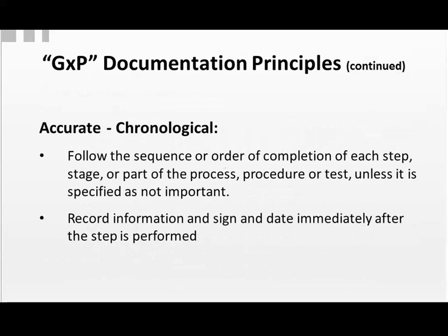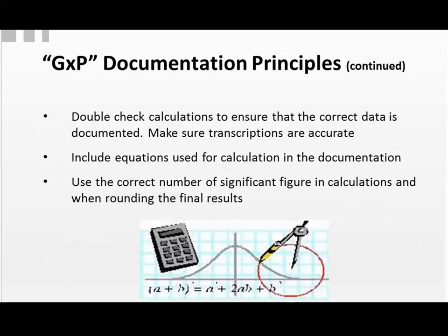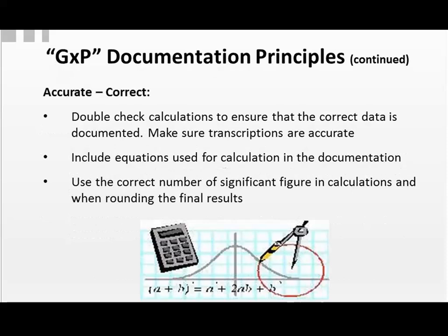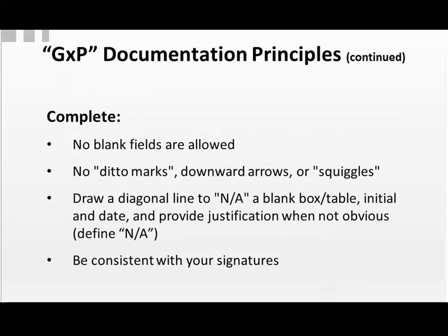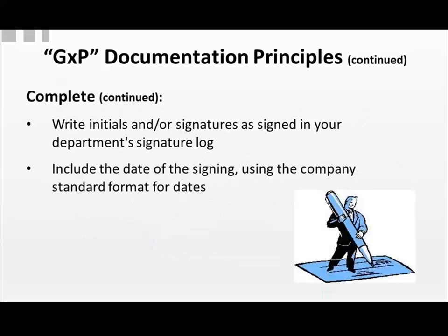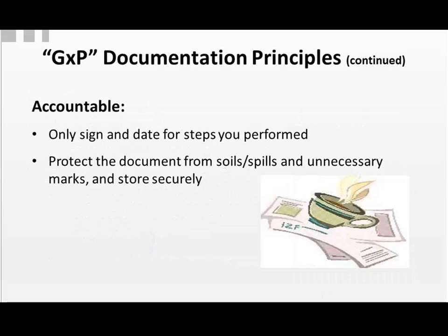Everything should be done in chronological order, and this should be part of your procedure to say that everything should be done this way. IQ should be done before you start your OQ execution. OQ results should be approved before you start your PQ execution. Functional requirements should be approved before you start your IQ. You also want to make sure you check all of your documentation. Make sure, too, that you're only signing for things that you're accountable for and you know the meaning of your signature.